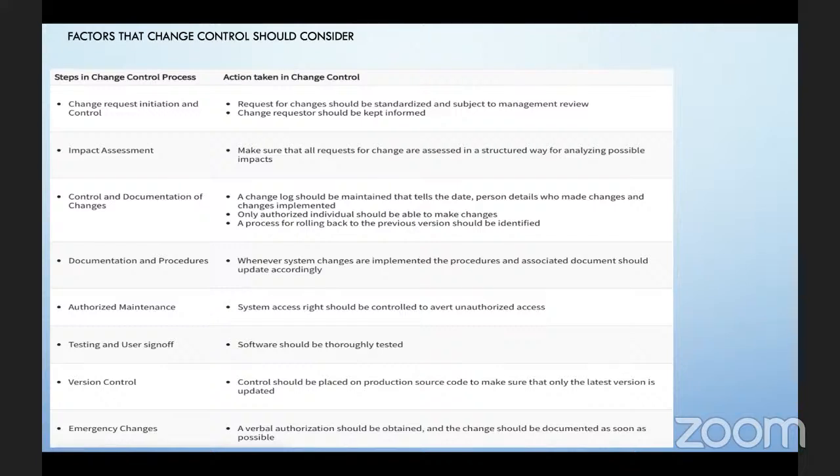So at the beginning of the project, it's very important to establish a change committee or change management board at the kickoff, so that if there's going to be a change in the future, or we need a different approach, or somebody doesn't like what they see, it comes from the right channel and the right person. We will welcome changes. When the requirement gets changed, it's okay. We don't have a problem.